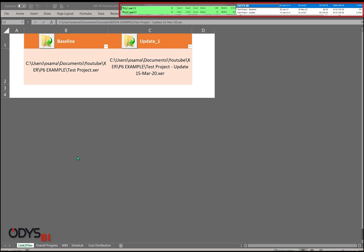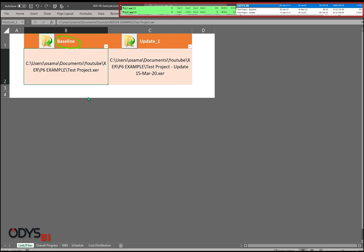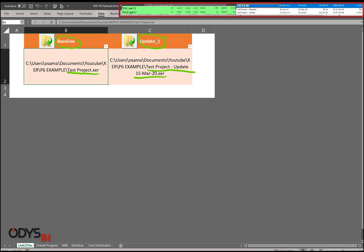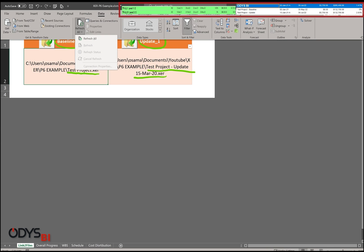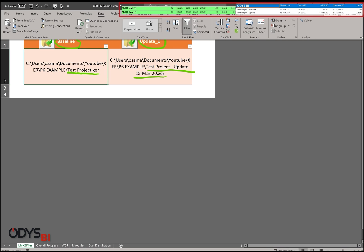Now let's open my Excel file which has a link to the XCR backup files of the baseline and updated projects. In my Excel workbook, the first sheet will be linked to files. As you can notice here, the baseline XCR with its path and the XCR for update 15 of March with its path. After this identification, I'll go to data, refresh all, and the process of importing the data from the XCR to my Excel file will start.